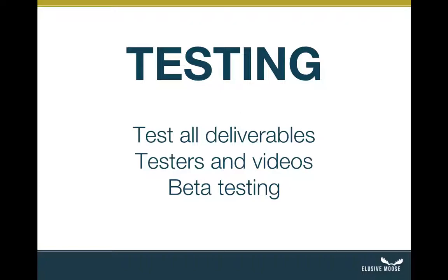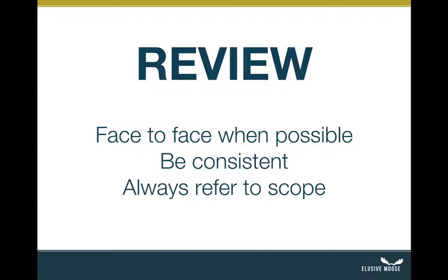But if you have a team, it's much better to do it before you show it to the client or hand it off. And there are some projects where you're inherently not capable of testing everything. For example, you took an existing system and you're upgrading it. We're not creating test cases for every screen, every button, so there's some communication that needs to take place with the customer. Yes, we test stuff, but I'm not testing all of this because we're not building it.